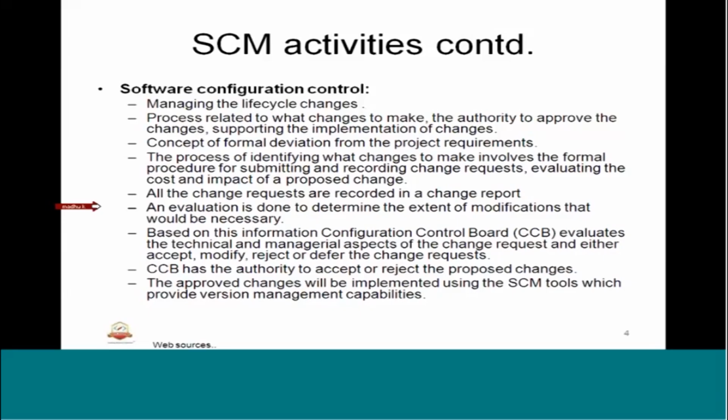The process of identifying what changes to make was the formal procedure for submitting and recording change requests and evaluating them. Evaluation also in terms of cost, schedule, what are the changes that the proposed change is going to make.